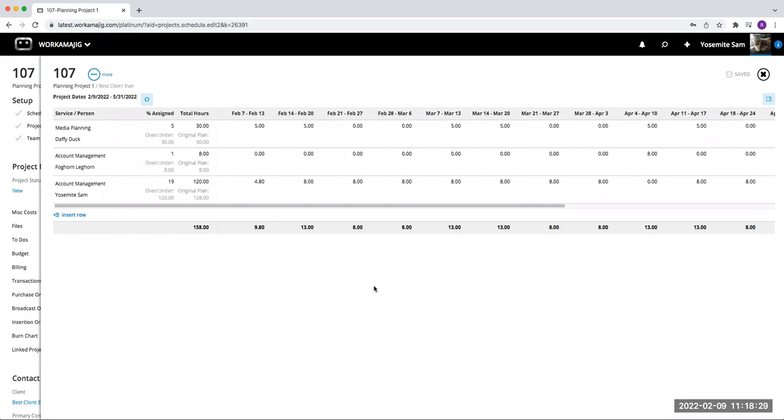So that just depends on, like, again, where you want this information to show. If it hasn't started officially, then it should be in a status that is inactive. So it does not necessarily show up in like people's Creative Today page. You can run your resource management tools for inactive projects or projects in a specific status. So again, if you're using the planning project for forecasting time and allocations and things like that, you would just need to make sure that you're running your staff schedule screen to include the status that the project is in. All right, so hopefully that helped.